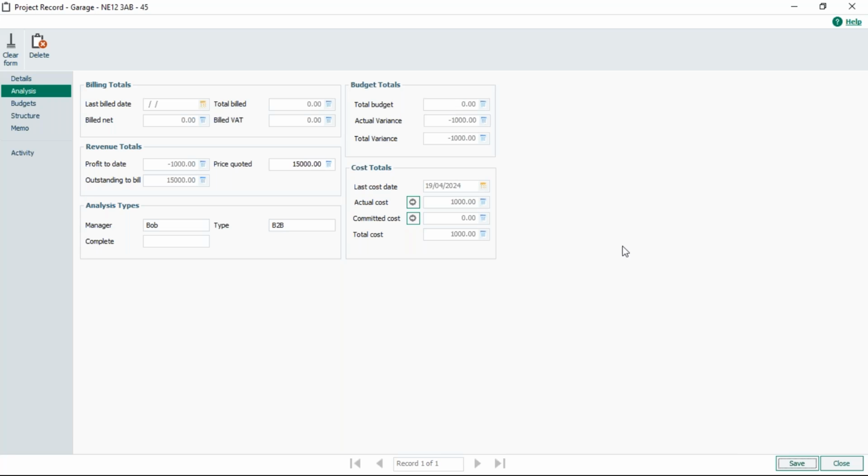Right, question just there about if there's already been a supplier invoice done some time ago that you know is for a project, maybe you didn't record it at the time, can you add this to the project afterwards? Yes, absolutely. We will be covering that one a little bit later on. So if you've already entered an invoice into the software and you weren't using projects at the time, but you are now, or you're about to, you can go and edit those transactions and assign it to a project. So we'll be covering that in the corrections section towards the end of the session.